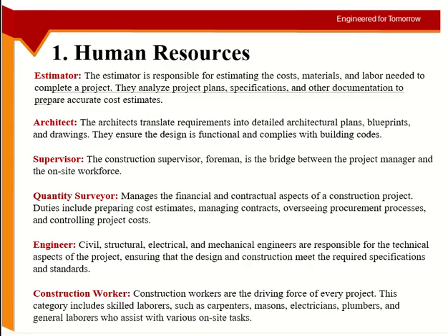Now within human resources, you have multiple people. The estimator, or quantity estimator, will do the initial estimation, the costing of the project. He will look at the resources which are required. He will estimate the resources, and for doing that he needs a complete plan, specification, and drawings of the project. So he is the guy who will tell you what resources you need.